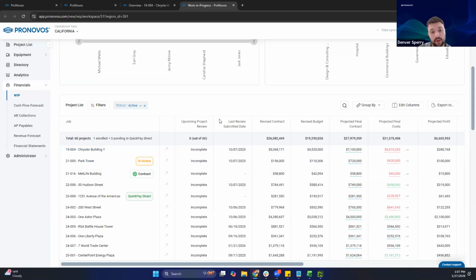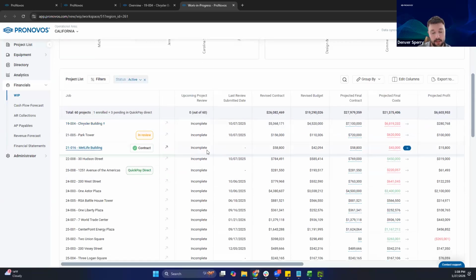Okay. Now, with the project review, there's a couple statuses, and I'll explain how it determines what. But the idea is that incomplete means haven't started it. I believe the next one is started. So something has been entered, some checkbox has been marked. Completed, meaning everything's at least checked off, and then submitted once everything's checked off and we click the submit button. So you'll be able to tell what the status of those project reviews is from the WIP report just by looking at this column here.